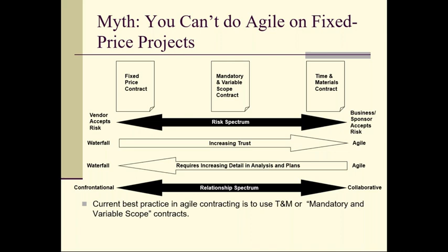If I say, hey, I know I said I wanted red, I changed my mind, I want green, the supplier is going to come back with, aha, see, that's a change request. Here's a form to sign. I'm going to charge you extra money now. They're going to do what they can to protect their profit, to protect their margins. So when there's a change or something that could even be interpreted as a change, it often creates conflict.